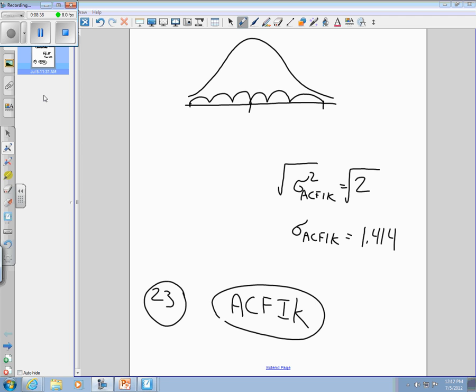Okay, now then, what they're saying is if you say what's the likelihood it gets done in 23 weeks, that's the mean, and they're talking about this area right here. That area that I just shaded corresponds to the likelihood that we would get done in 23 weeks. And that area right there is 50% of the total area. And another way of saying that is there's about a 50% chance that we'd get this project done in 23 weeks.